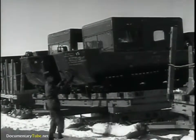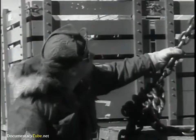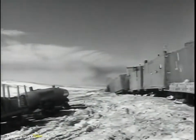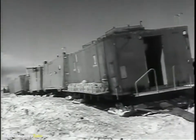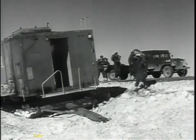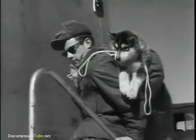Even the vehicles we used at the site had to be transported over the ice on big bobsleds. We called these convoys of 10 and 20-ton sleds heavy swings. Crawling up the ice cap at approximately 2 miles an hour, a heavy swing would reach the camp in about 70 hours if everything went well. We used wooden caboose-like trailers, wanigans, to house members of the construction crews for the 3-day trip. Mukluk, a 3-month-old Eskimo sled dog, went along as camp mascot, strictly against regulation.